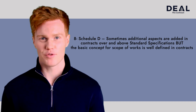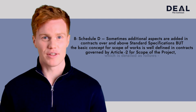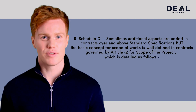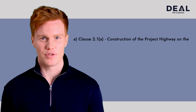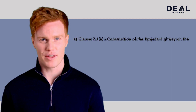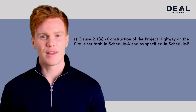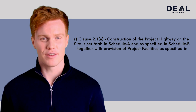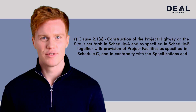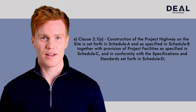The basic concept for scope of works is well defined in contracts governed by Article 2 for scope of the project, detailed as follows: Clause 2.1(a) — construction of the project highway on the site as set forth in Schedule A, specified in Schedule B, together with the provision of project facilities as specified in Schedule C, and in conformity with the specifications and standards set forth in Schedule D.